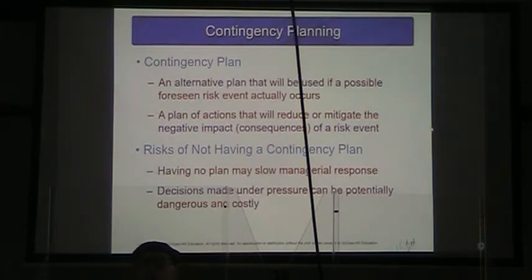All right, what happens if we don't have a contingency plan? Well, that may mean that when the risk event happens, we have very slow response because we have not planned what we're going to do if it happens. When that happens, when we make those decisions under pressure, potentially they can be very dangerous or very costly to the project or to us personally.